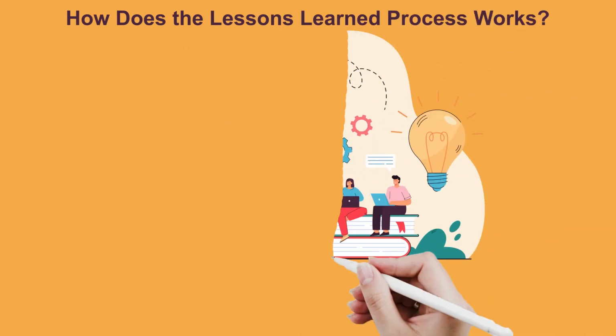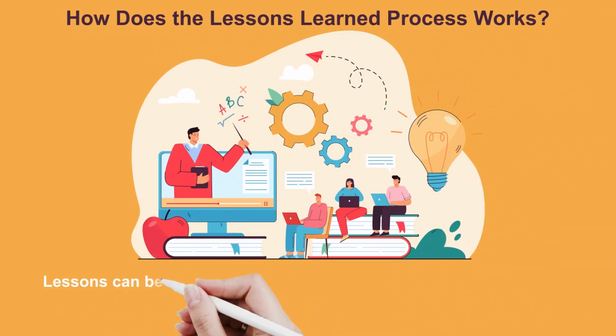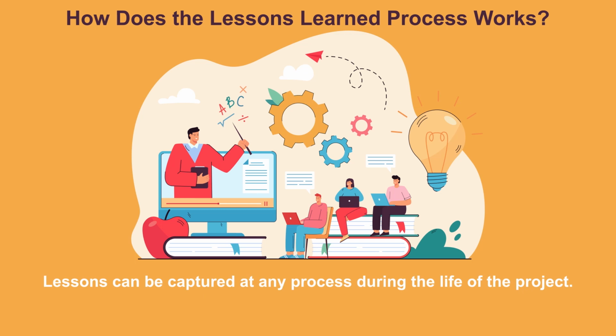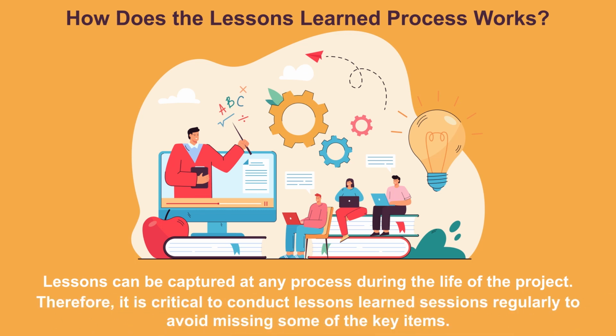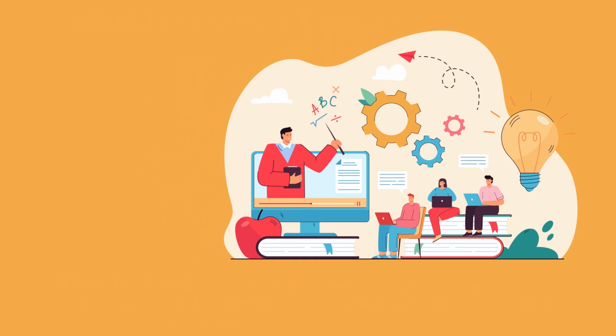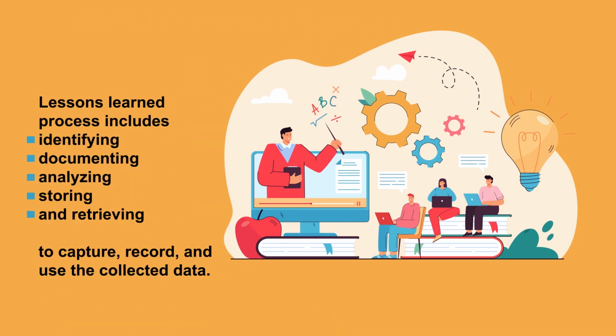How does the lessons learned process work? Lessons can be captured at any process during the life of the project. Therefore, it is critical to conduct lessons learned sessions regularly to avoid missing some of the key items. The lessons learned process includes identifying, documenting, analyzing, storing, and retrieving to capture, record, and use the collected data.